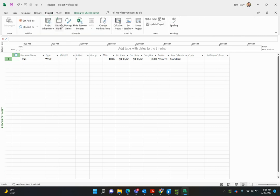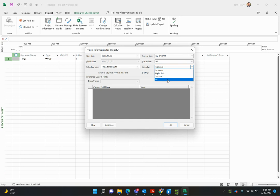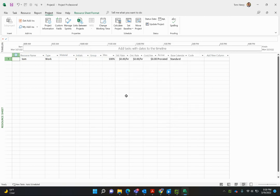When you create a new calendar in Microsoft Project, I'm going to come in at the Project Information and see my project calendar. I created my UK calendar, but the standard calendar was the same. The UK calendar is the one that is actually 7.5. You must add that for your project calendar as well. Don't be fooled by thinking it's doing the 7.5s. The calendar must be set as this as well, in case you have a resource that isn't working in the same pattern as a UK resource.